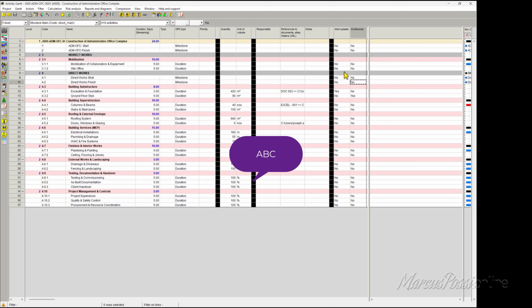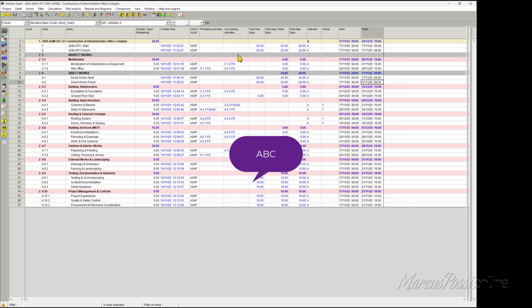If you have a special calendar for your resource, even continuous, the activity will work only when it has its resources. It's logical. But we are not planning resource here. Okay, you are not planning resource, so you may set your activities with their specific calendar.